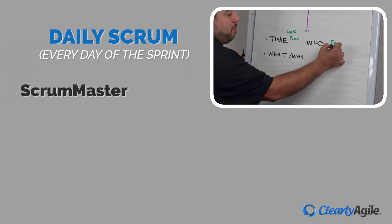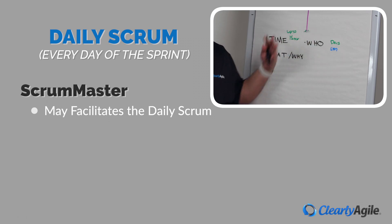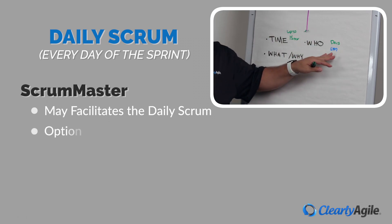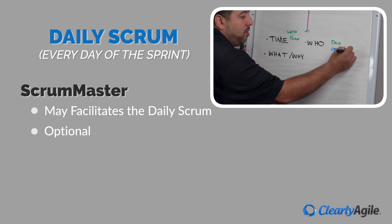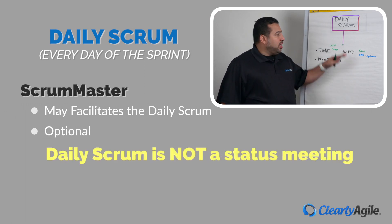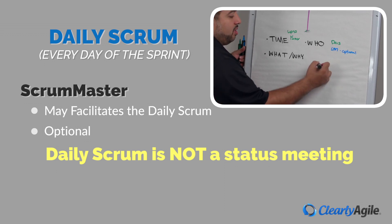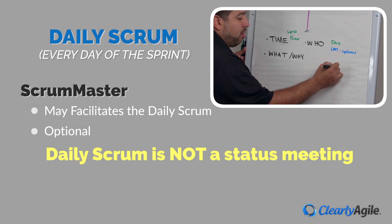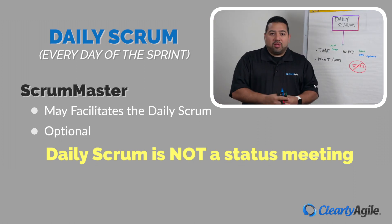We have within the Scrum team a Scrum Master. The Scrum Master typically would facilitate the daily Scrum, but the Scrum Master is optional. A lot of people don't realize this — they think that the daily Scrum is for the Scrum Master to get an update. The daily Scrum is not a status meeting. We're not here to talk about the status of all the items; we're here so the devs can sync up with each other.